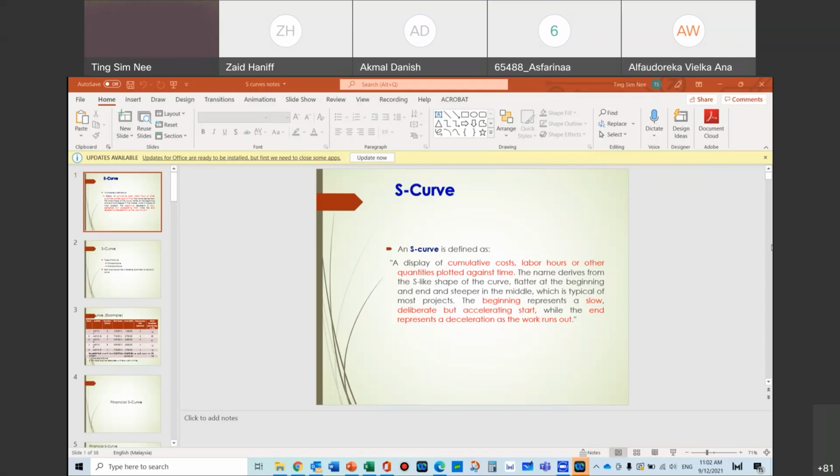So these are some of the clients, not some, actually a lot of clients are like that. That is their kind of attitude. They want to use the money. The money is not theirs. It's like a government agency. Sometimes it's the budget that they have from the government, and this is taxpayer money, of course. So they want to do more, just to finish the budget. Otherwise, if they don't finish the budget, they have to send it back to the federal or the state government, and then it's very difficult to get future budget again. So they will prefer just to expand the scope of work as well. So that is top-down budget.